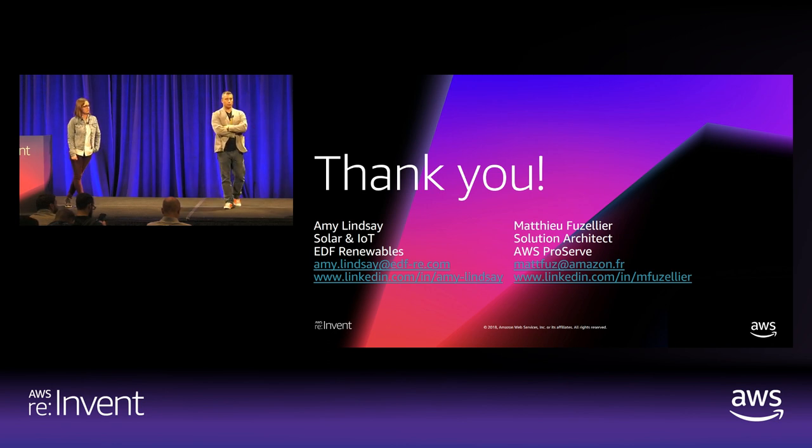We started from the working backwards PR FAQ process. That means that before even doing the POC, we really focused on what business value we are trying to achieve, and clearly defining what product we want to launch. I think this is a big part of getting support or funding. It's really important to focus on that as a start, so that you know that whatever you're building down the road has a business value. Maybe the POC learnings make you realize that you don't want to go that way, you want to go another way. That's fine. You can pivot and adjust, but you know that what you're building from the start answers the need of your customers, whether they're external or internal, and that you really have business value coming out of that project.